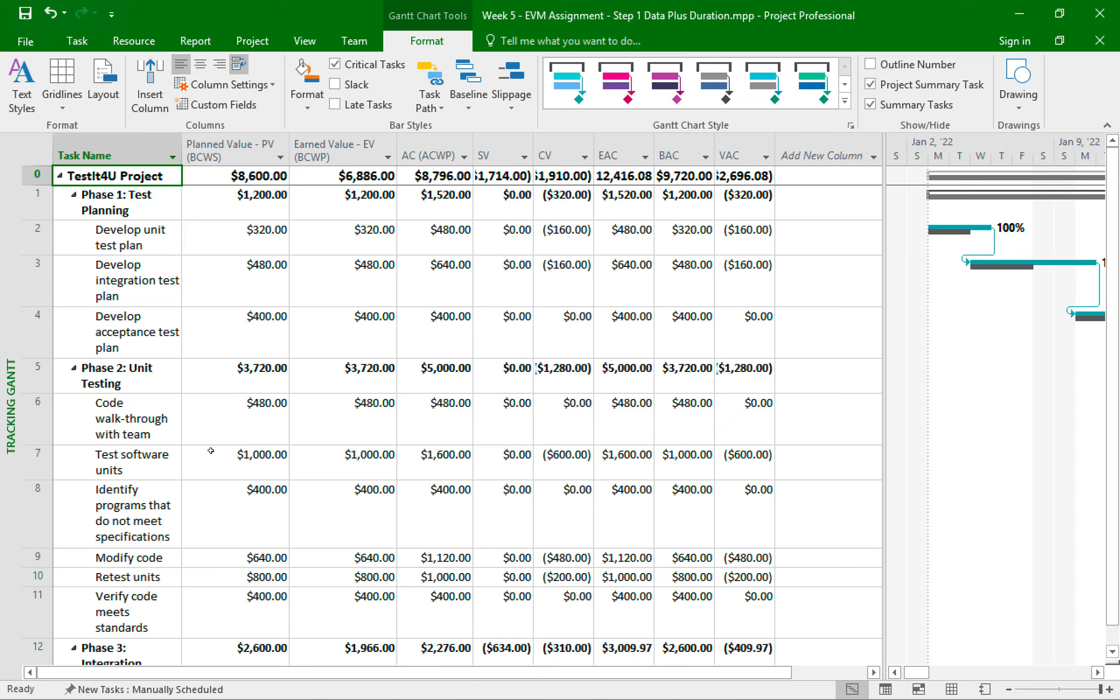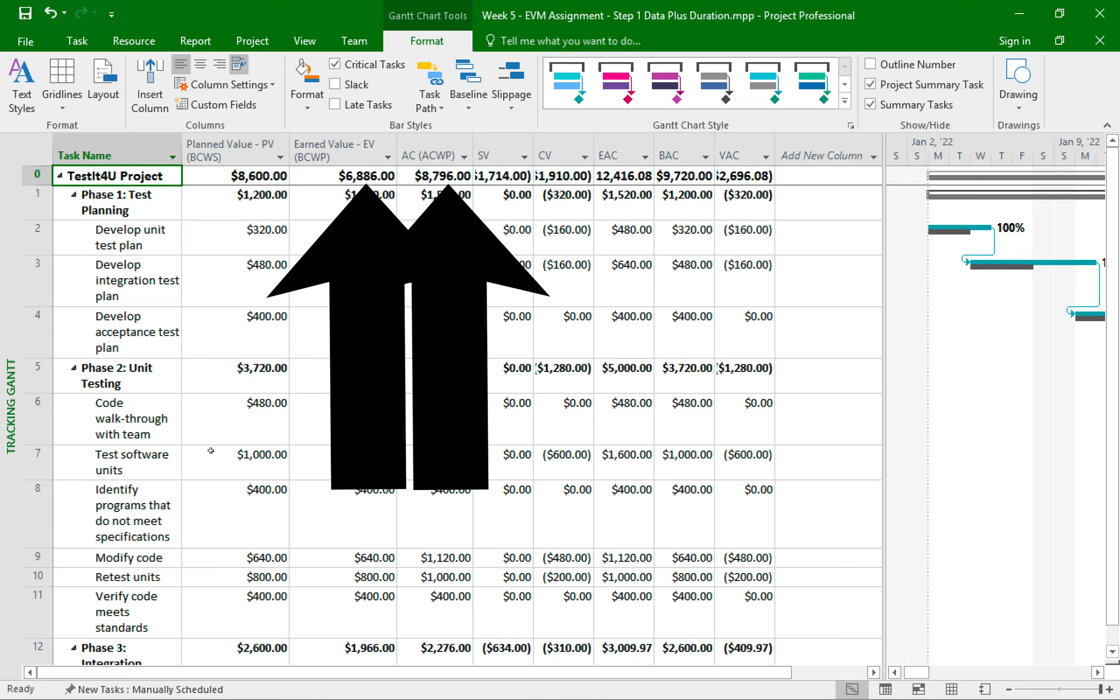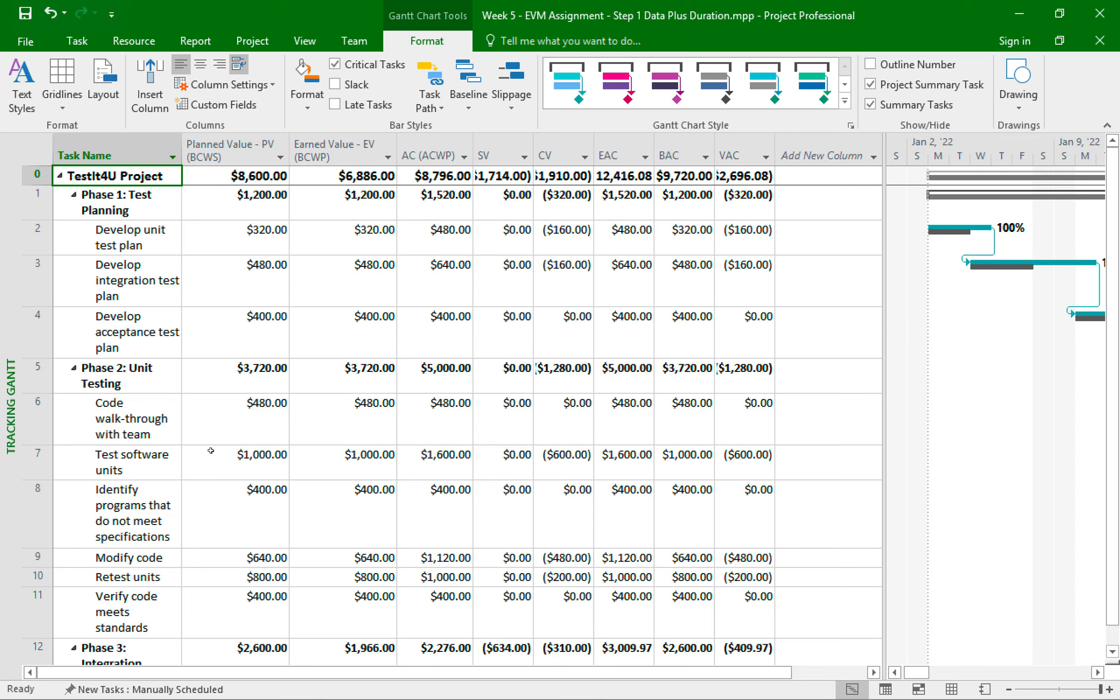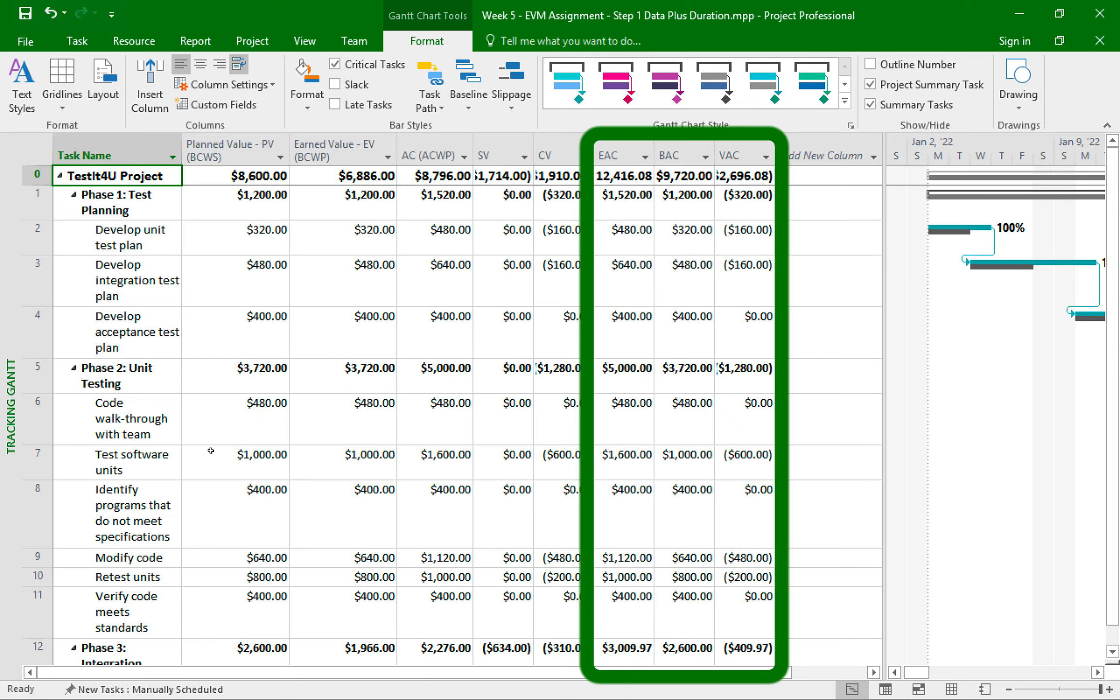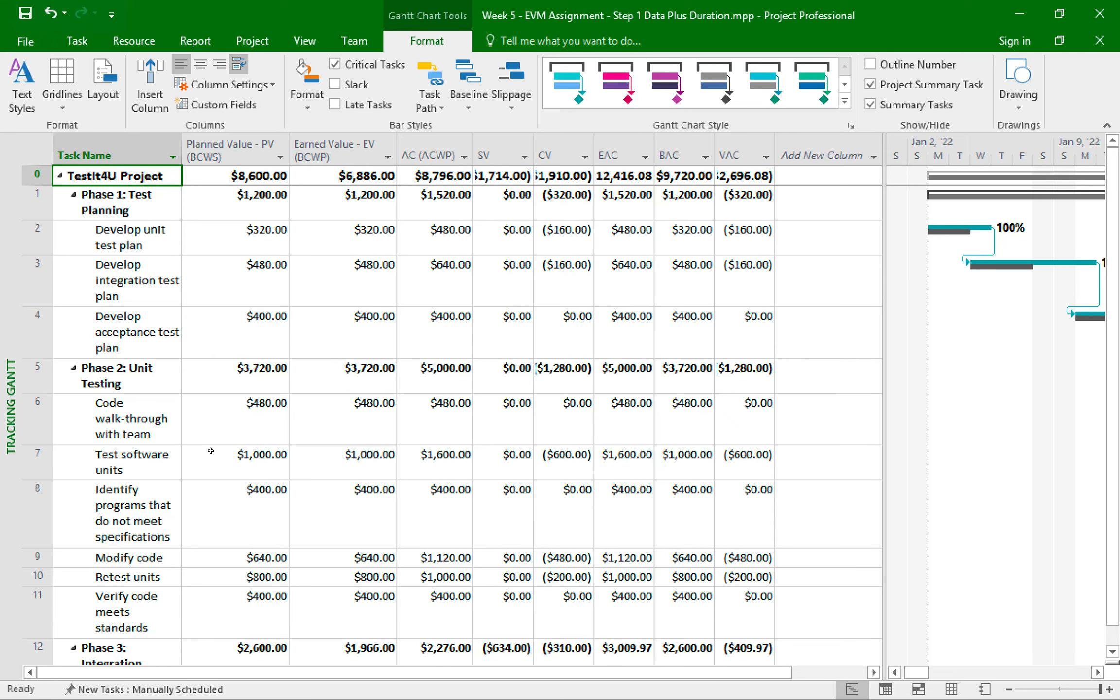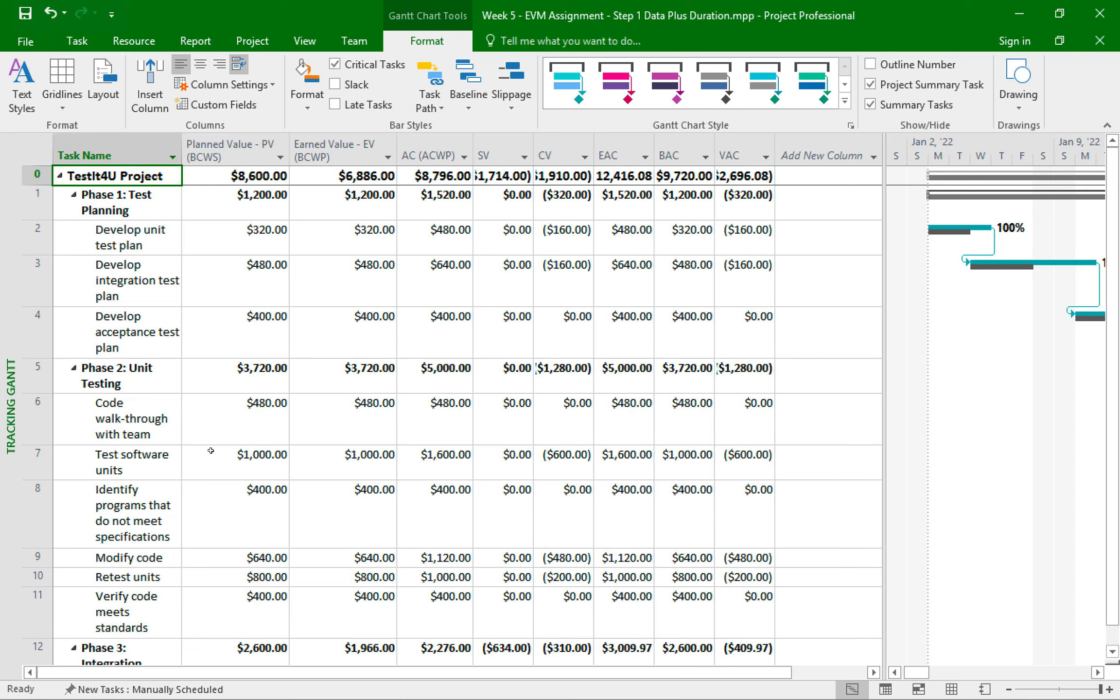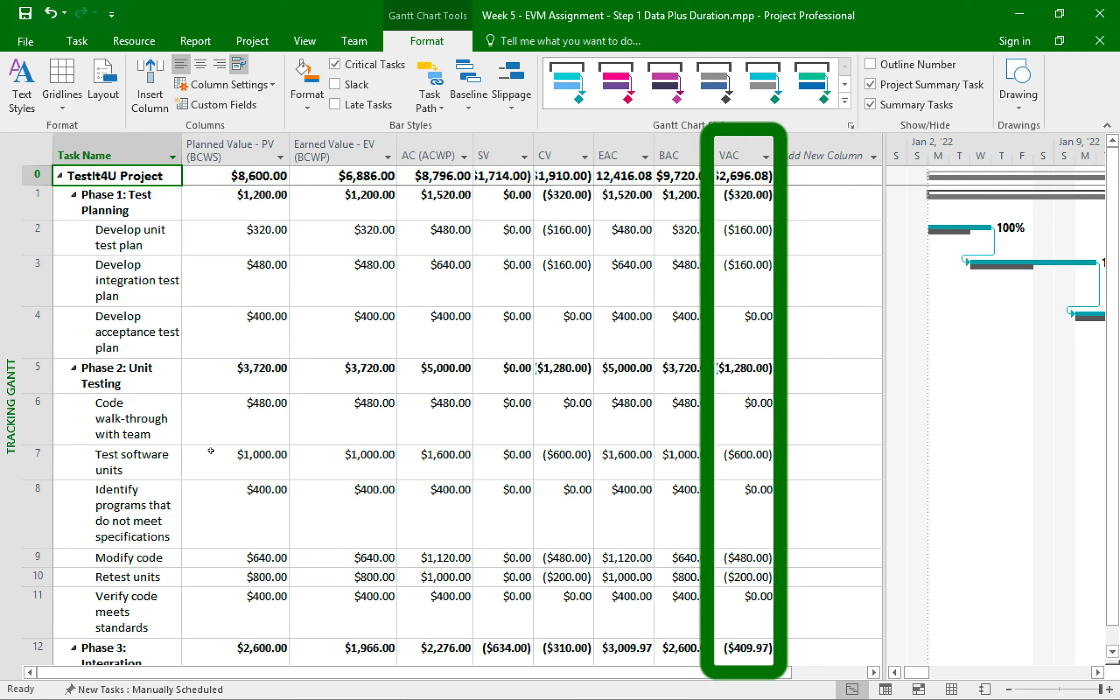This will display the earned value table with all the detailed numbers you can use for your earned value analysis. For example, here are the two numbers that appear at the top of our earned value report. And this table also shows the scheduled variance and the cost variance. This table also shows these three columns, the estimated at completion, the budget at completion, and the variance at completion.